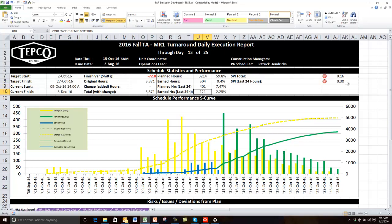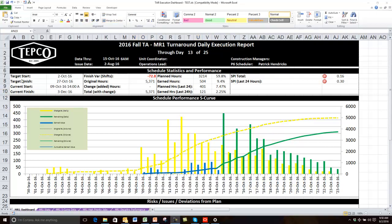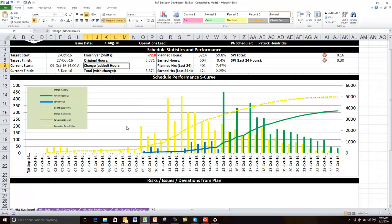I can build in the formulas to calculate the SPI, which is the earned divided by the plan. This formula right here is U10 divided by U9, giving us the SPI. These are just percentages — a percentage of what that day was worth in correspondence with the overall turnaround hours. So this is U10 divided by N10, where N10 is the total change baseline hours. The point is there are formulas built into the Excel file, which is great because we want the ability to do that.